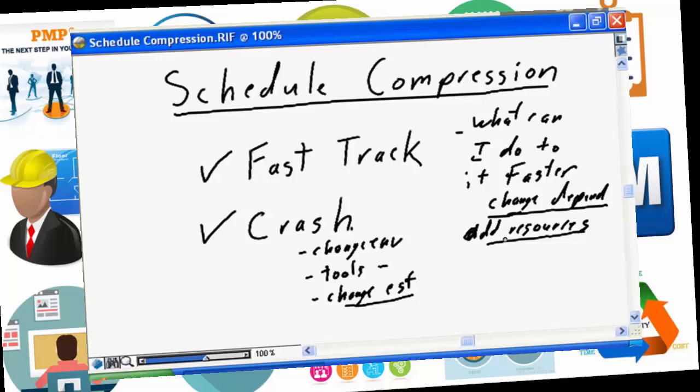Do this only if I truly, honestly believe that if I reduce the estimate for these future tasks, this revised estimate is in fact the likely estimate that will be produced, as opposed to just blindly changing the estimates now to produce a more favorable finish date, only to have the estimates rechanged by the team members when they're working on the tasks, through the revised ETCs, back to the original date, back to possibly even a more pessimistic finish date.